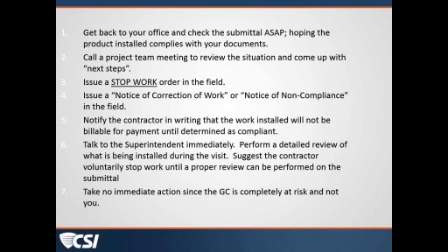There are items that are critical to the project schedule to receive early. And some of those can be pretty onerous packages to go through. What often happens is that we are sent whatever it is that the contractor has received from a subcontractor.